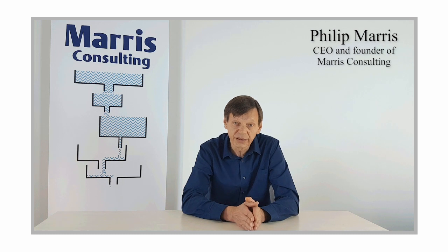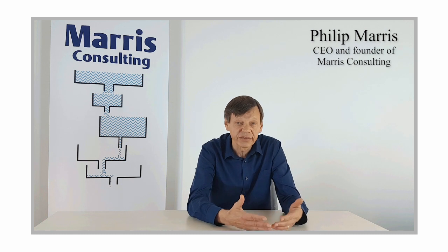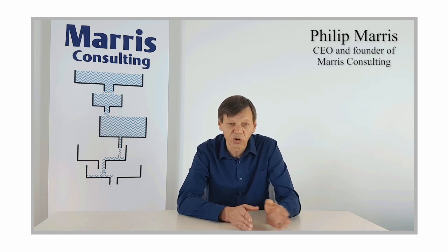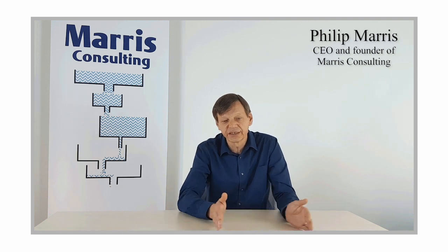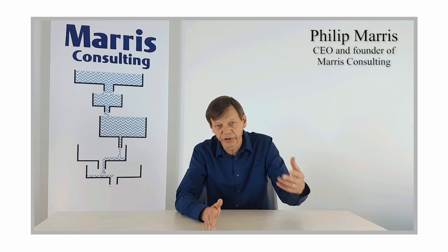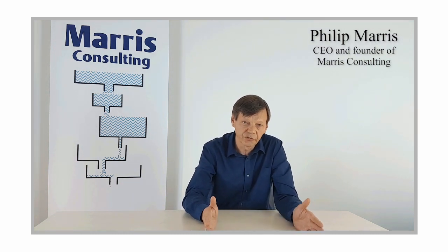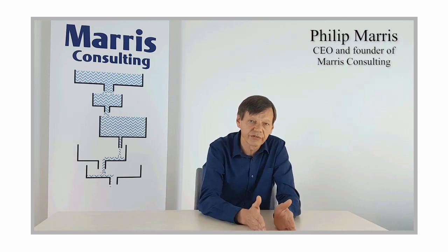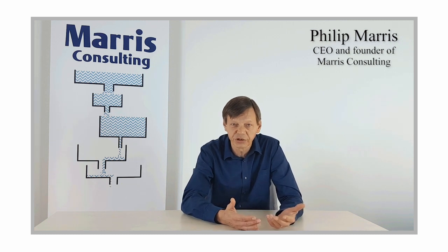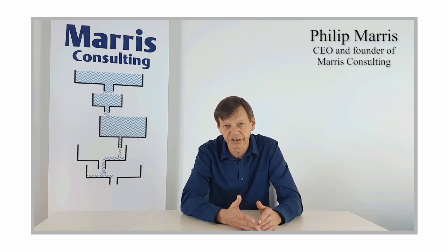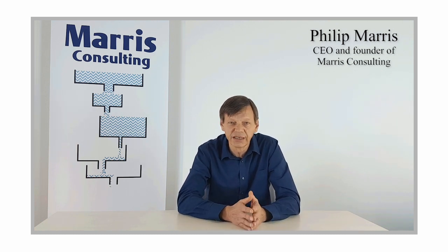chose a partner, a mold manufacturing partner, and they built a long-term partnership. They gave them or lent them one of their manufacturing machines so that the mold could be tested immediately in situ with the mold manufacturer. And basically they managed, and they did all sorts of things with regards to priorities, reserved capacities, scheduling and so forth. And they shrunk the lead times of making a mold from 5 weeks to 5 days, okay? And they got rid of that problem. They put their mold manufacturing under control with a partnership that was acting fast, and that problem disappeared, okay? That's just one example among many.